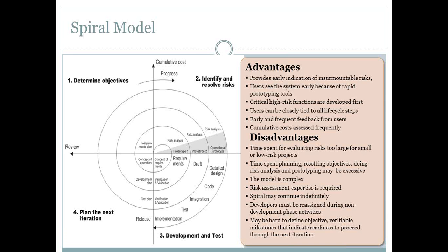So you'll identify what the key risks of the project are, right? So do some proof of concept to ensure that those risks are resolved. Then you do the development for that particular thing, and then look at the next set of risks available for the project, right?